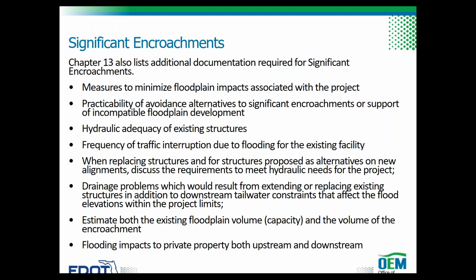If the project will result in significant encroachment, the location hydraulics report should discuss the following items in addition to the items required for minimal encroachments. Measures to minimize floodplain impacts associated with the project. The practicability of avoidance alternatives to significant encroachments or support of incompatible floodplain development. The hydraulic adequacy of existing structures. The frequency of traffic interruption due to flooding of the existing facility.